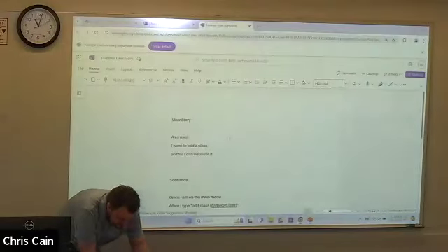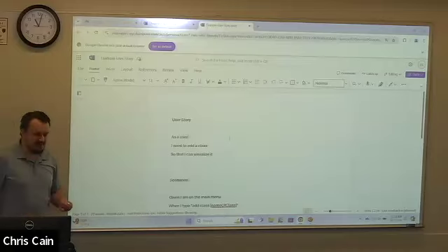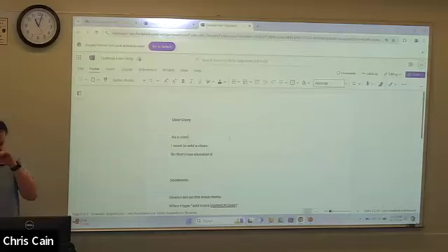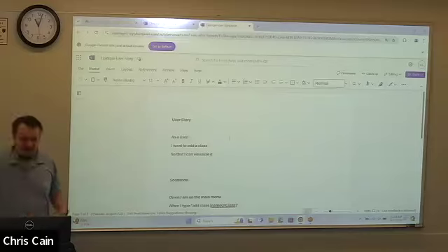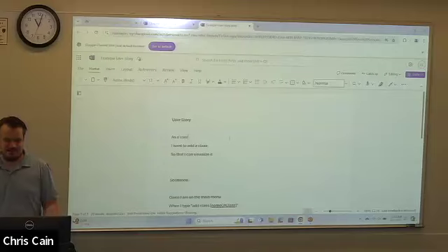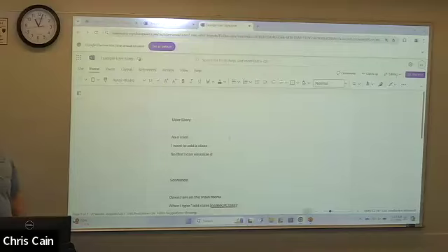I wrote a very basic user story for adding a class. I said, as a user, I want to add a class so that I can visualize it. Very simple, client-centered, client-focused. There's nothing technical about it. I want to be able to add a class so that eventually with this UML diagram, I can see and look at the structure of the classes that are embedded in my code. I want a visual representation of that structure. From a client's perspective, I don't care how that's done. I just want that functionality to be there.